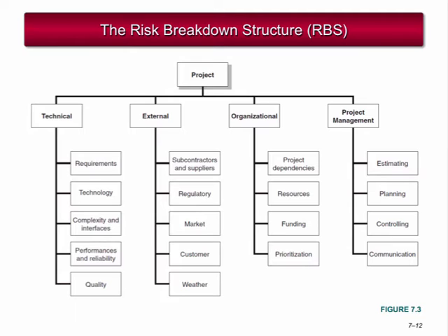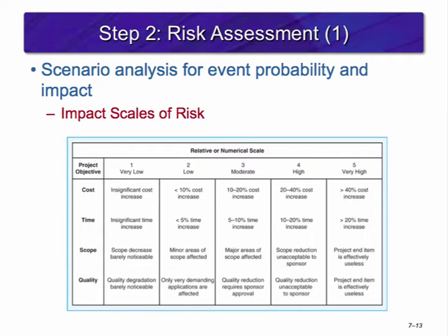Risk profiles, a list of questions that address areas of uncertainty in a project, are updated and refined during the post-project audit. Of all the risks identified in Step 1, the most significant risks should be assessed first. All risks are analyzed in terms of probability and impact. Scenario analysis is most commonly used for analyzing risk for probability and impact.